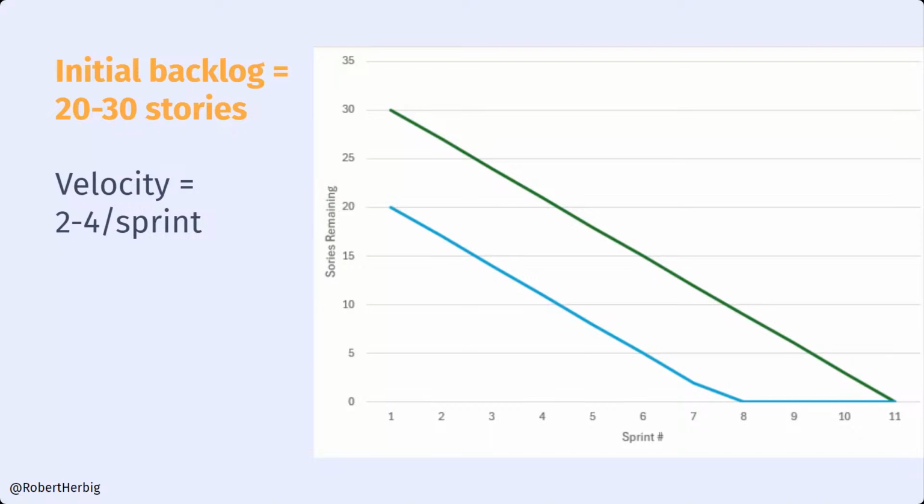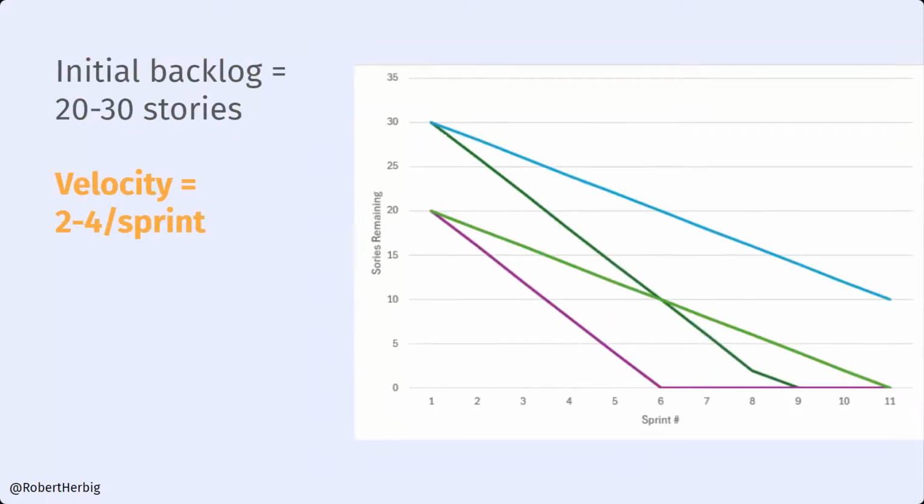It might be 20 today, and those are pre-split stories, and I'll explain split in a minute, but pre-split stories. And then we need to think about the work that actually gets done, the 30, as post-split. So we have different units here, but we'll talk about this range. Likewise, our velocity is also different. And you can see that as we start introducing ranges, instead of using averages, I'm introducing multiple projections that have different combinations. So just 20 and 30 for our backlog, and just 2 and 4 for our velocity gives us 4 possible outcomes. We've charted the 4 here.